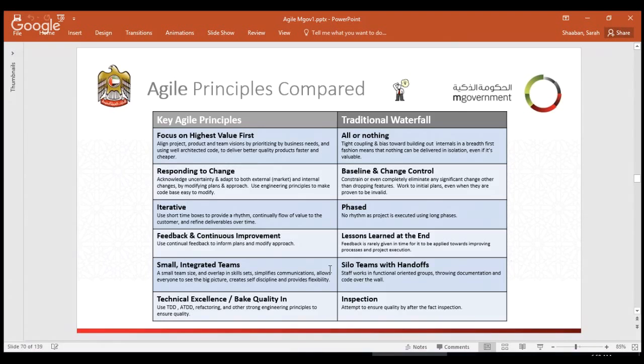In the agile, it is different. We always tell the project managers, please do not just accept or reject the change, please respond to the change. So please plan the change. So put it in the next iteration or put it in the product backlog, for example, so you can plan for it in the following iteration.